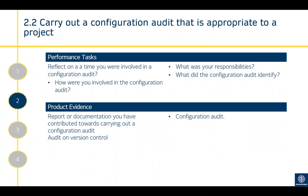Criterion 2.2 is to carry out a configuration audit appropriate to a project. That is ensuring all documentation is correct and fully up to date, the right quantities are tracked, locations and inventory are correct, and that processes for managing changes and requests are correct and the correct items are being used. Reflect on how you were involved in a configuration audit, what your responsibilities were, and what the audit identified. Product evidence would be a report or document contributing to a configuration audit, or audit and version control documents.